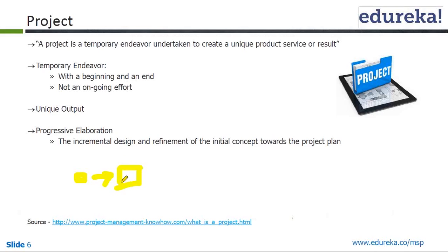For example, initially you will know how many stories it will be: let's build a project, a building in a certain location. Then as time progresses, you will have an idea about how many stories and floors you are going to build. That will again depend on various factors like the demand in the area, and essentially there could be regulations in that area. If the aerodrome is nearby, they will not allow you beyond a certain height. So all those things will be taken into consideration.